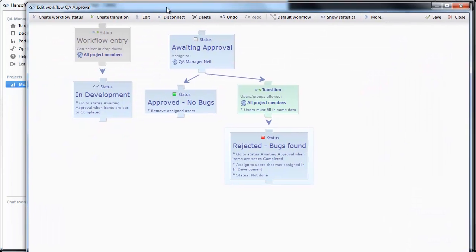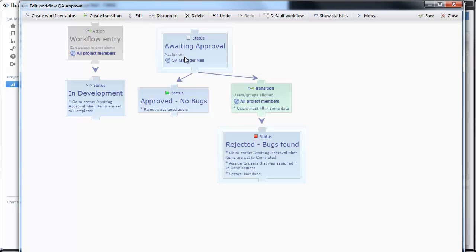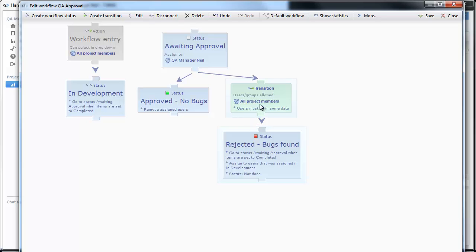So this is the QA approval. The first step is that it is in development. From in development it will go to awaiting approval when the task is done. From there it can either go to approved no bugs or rejected bugs found. And we have also requested that a comment is filled in when somebody rejects the feature.